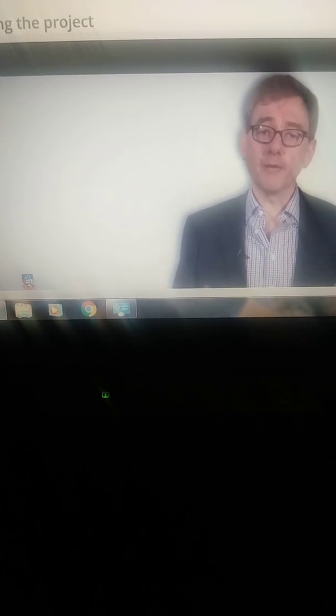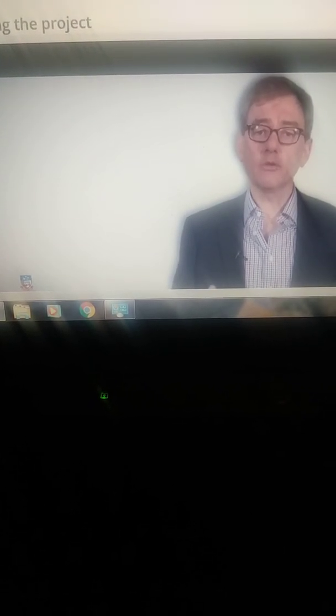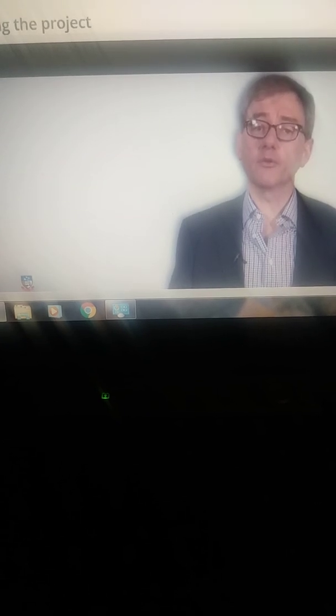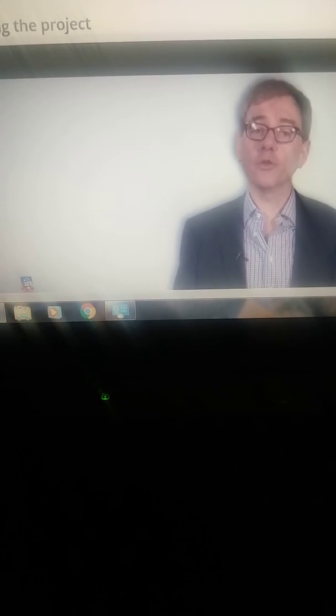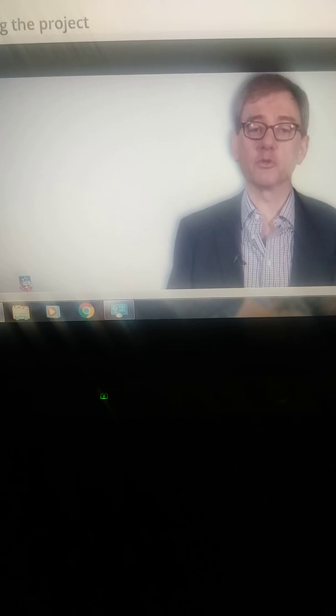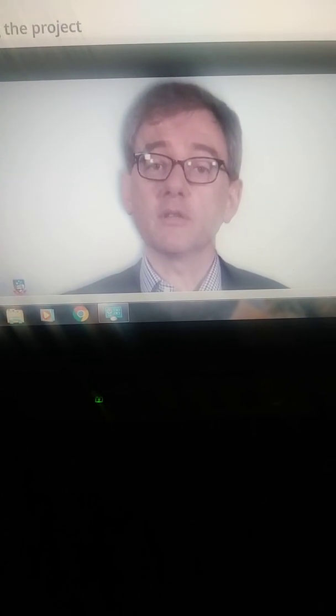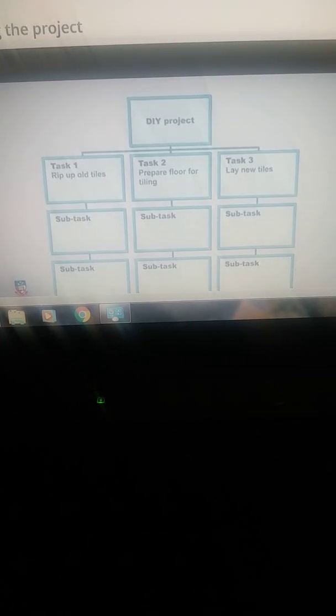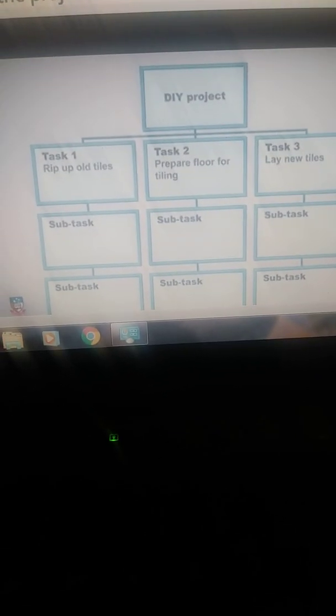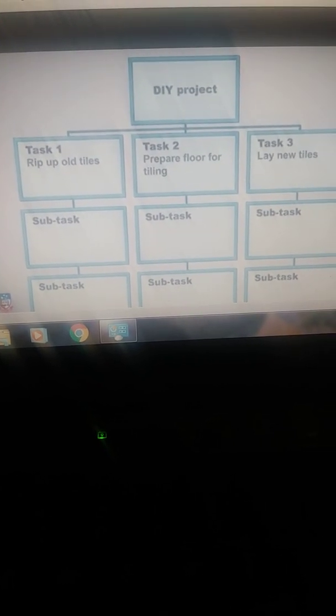Now, reflecting on the project, how do you deal with the additional costs that have come about through undefined activities or the temptation to add more items to scope? Where a budget has been fixed, we would need to revisit the original scope and work breakdown structure to consider the proposed change addition and how it might impact on our schedule and whether it is achievable.